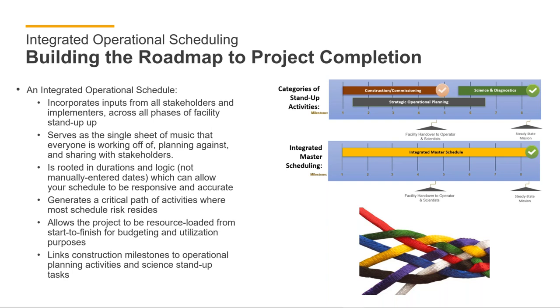A key component of integrated operational schedules is that the data contained in them is rooted in activity durations and activity logic, and not dates that are just thrown against the wall and hopefully met. When you focus on duration and logic, your schedule actually becomes flexible and adaptable to real conditions on the ground as activities become delayed or as risks become realized.